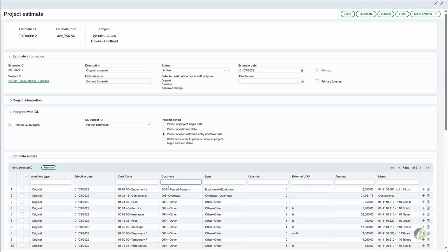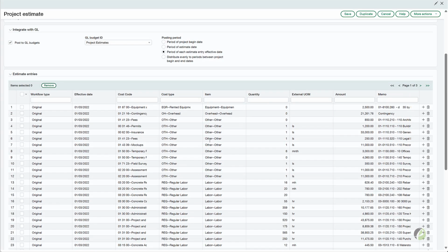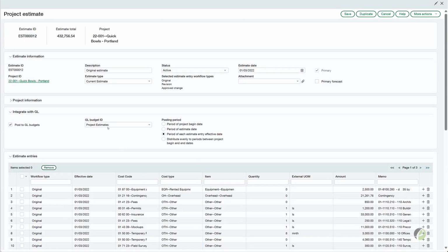And it goes down to the cost code and cost type. So imagine if you wanted to see, goodness, I was really under budget on the cost here. How did I do so well? What cost code was the reason for that? Or what cost type? Was it that I came in under budget on labor or subcontractor or materials or what? So super great. You get to see that. And that again lends itself to the dashboard.